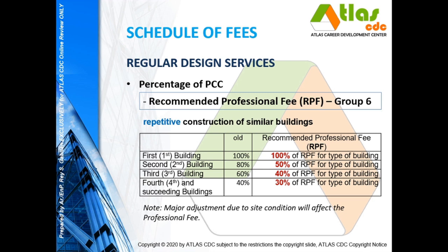Now, your fee can have some adjustments, no? Due to site condition, even though you are using a prototype design, there could be major changes because of the site condition. Now, why does your fee become lower as you go along? Because for the simple reason that you now have a base plan to use, no? So it will be easier work on your part.